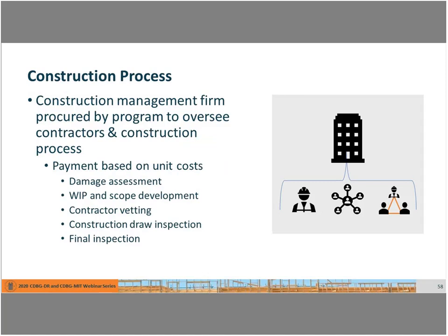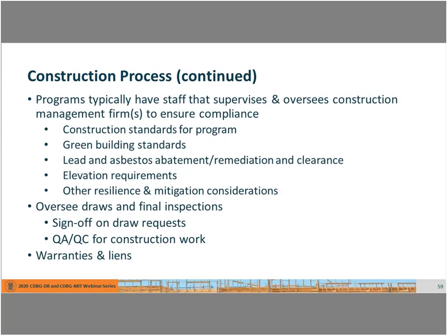Many programs find they don't have enough staff with construction expertise available to manage their program. They typically procure construction management services. As you see in this slide, the list of costs that you see here represents the typical units of services that are reflected in a construction management scope. And as I mentioned in the prior slide, oftentimes these are priced separately so that you have control over how much is being paid based on the volume of services to be provided.